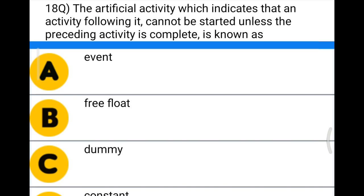Next question: the artificial activity which indicates that the activity following it cannot be started unless the preceding activity is complete is known as — Option A: event, Option B: free float, Option C: dummy activity, Option D: constant. The correct answer is Option C, dummy activity.